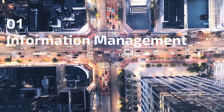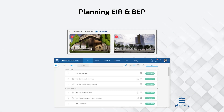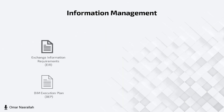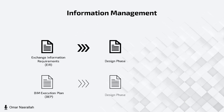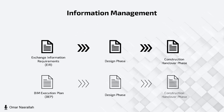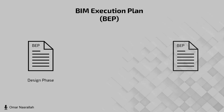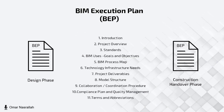At the early stage of the project, we were represented as the client Ziggurat. We created the Employer's Information Requirements (EIR) using Plannerly, managing all necessary information that the lead appointed party shall use to plan their BEP. All information about the project was given in the AIR, covering project information, project standards, responsibility matrix, BIM uses, and meeting schedules.